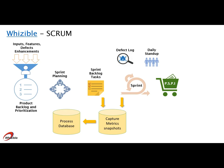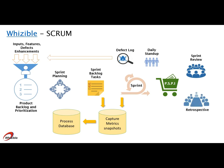During this stage, the system automatically captures data for metrics from the planned tasks, defects, and the task actual updates. This information is stored in the system as a snapshot and used by the quality team for analysis.